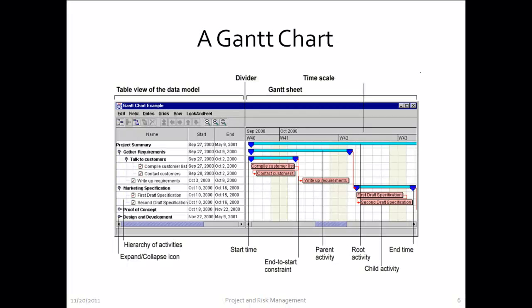This slide shows a project schedule on a chart known as a Gantt chart, which is a horizontal bar chart. The right-hand side illustrates the start and finish dates of what are known as terminal elements, shown in light color, and summary elements, shown in boldface. Terminal and summary elements break down the tasks needed for the project. Most Gantt charts also show the dependency between activities in a precedence network, and can show current schedule status using percent complete shadings and a vertical today line.